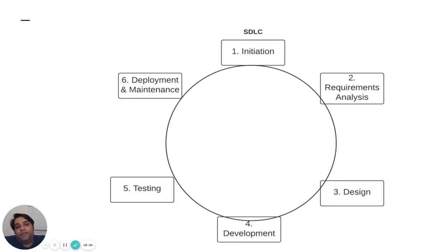Key outputs of this phase are a conceptual architecture, functional design specification, technical design specification, and an updated requirement traceability matrix. So RTM is where you break down all your requirements into tasks and create a matrix out of that. Nowadays, you can create it automatically through Jira using some automated tool.